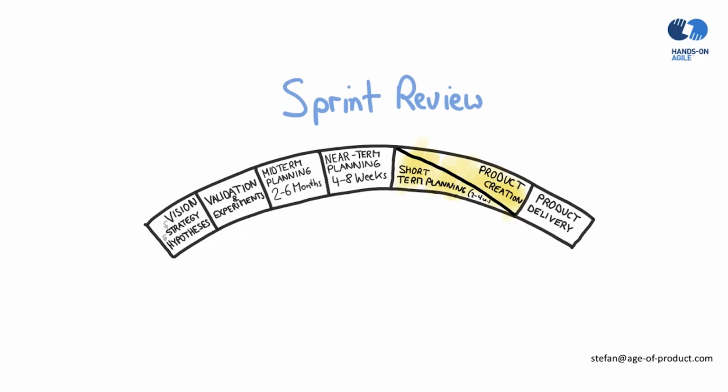The product owner explains what backlog items have been done and what has not been done. The development team discusses what went well during the sprint, what problems it ran into, and how those problems were solved. You may remember that in the early versions of the Scrum Guide, the sprint review and the retrospective were fused together into one event. I think it was Ellen Gottesdiener who suggested, okay, let's split this up into two events. The development team demonstrates the work it has done and answers questions about the increment. The product owner discusses the product backlog as it stands. He or she projects likely target and delivery dates based on the progress to date, if needed.